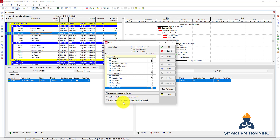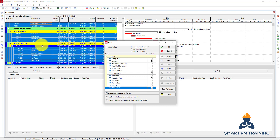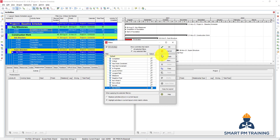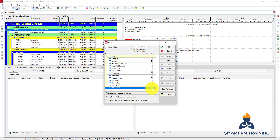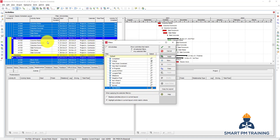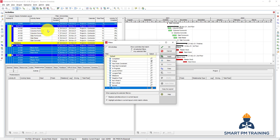Let's choose Highlight Activities. First we need to show all activities, then apply. I want Critical and Not Started, and I'll select All Filters so I get a specific selection of activities. I'll choose Highlight Activities and click Apply. Now the matching activities are highlighted — those not highlighted do not meet the conditions. My conditions are activities that are critical as well as not started; both conditions must be met.